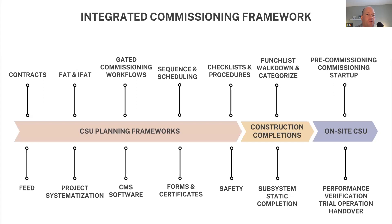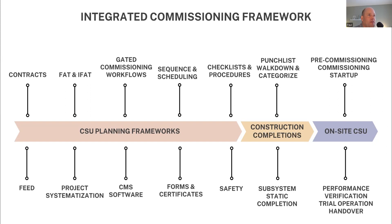The last framework is on-site commissioning and startup, with six project management frameworks required — covering pre-commissioning, commissioning, startup, performance verification, trial operation, and handover. These processes are tracked in commissioning management software so each subsystem progresses through workflows with sign-offs at each gated process.